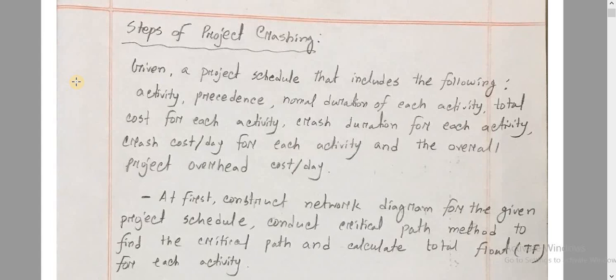Given a project schedule, the inputs include: the activity precedence, normal duration of each activity, total cost for each activity, crash duration for each activity, crash cost per day for each activity, and the overall project overhead cost per day. We have to read the project schedule carefully, noting all activities and their associated costs.